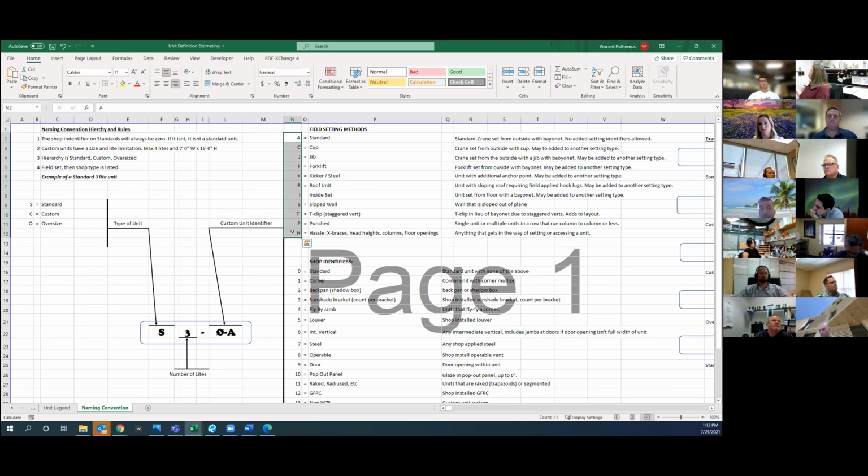From 2018 through until today, we started gathering data on how long it actually took to manufacture each of those different kinds of units, as well as how long it took to install those units. And it was done on more of a daily basis. So we keep track every single day of what units go through the shop and go through the assembly line, for example. At the end of the day, they click off what units they made from the pallet schedule.